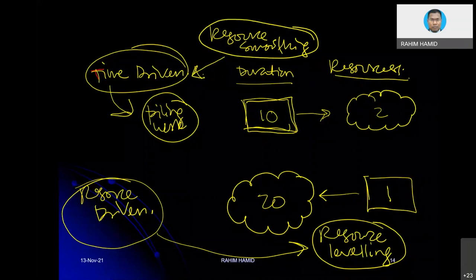For many high-rise buildings, for instance, in a normal situation, we only set up one tower crane. Meaning to say, with one tower crane we already lock only one resource, even though in certain situations we might need to use more than one crane at one time. But because there is no space to put another crane in that particular area, we have to make do with available resources. And what we need to change is basically the arrangement of activity.